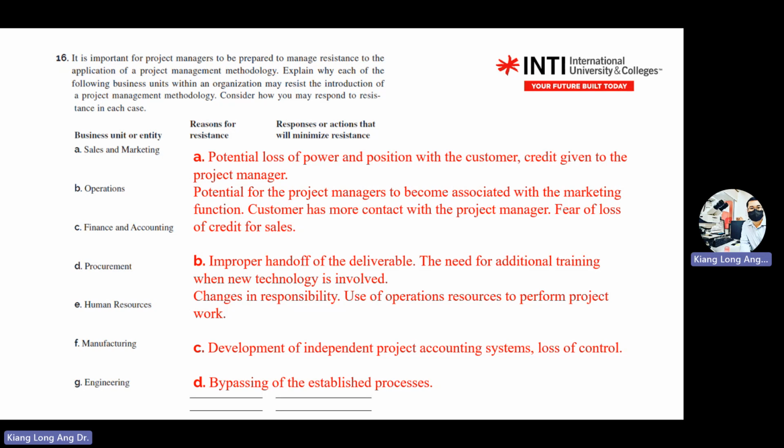You call your friend, and maybe during the coffee time you just say, oh, you are managing this one, and who knows, your friend actually is the supplier for that particular item, and then you make the decision unconsciously. I mean, during the tea time, and then the PO comes in and so on. So the fear for procurement is that the project manager might bypass the purchasing process.